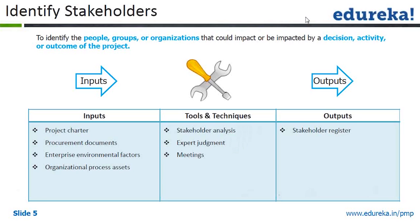We need to create a stakeholder register as a document for every project — it will have the names of all the people involved. Remember: when we are looking at stakeholder identification, we don't identify stakeholders just by designations. Stakeholder identification should be in terms of the actual name of the person.